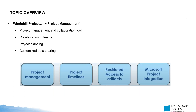On the project management side, one useful feature is that Windchill integrates with Microsoft Project. You can take a project plan created in Microsoft Project and import it directly into Project Link. If you need to make changes, you can export the plan back to your local drive, modify it in Microsoft Project, and then synchronize it so that those changes are reflected in Project Link.